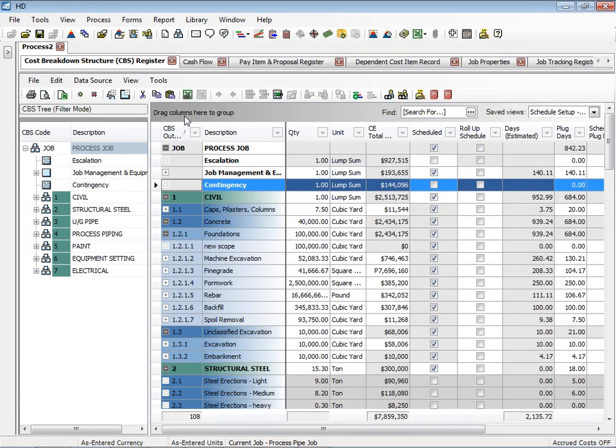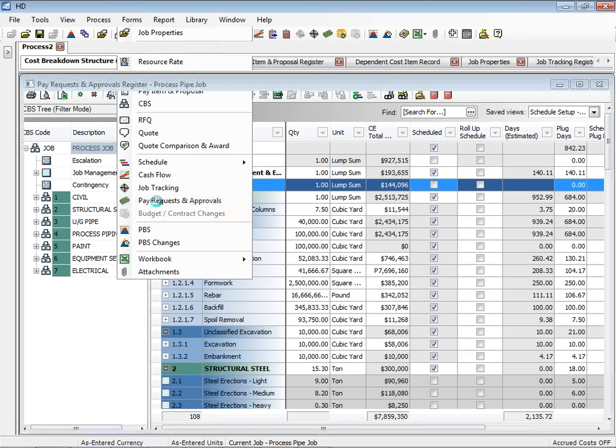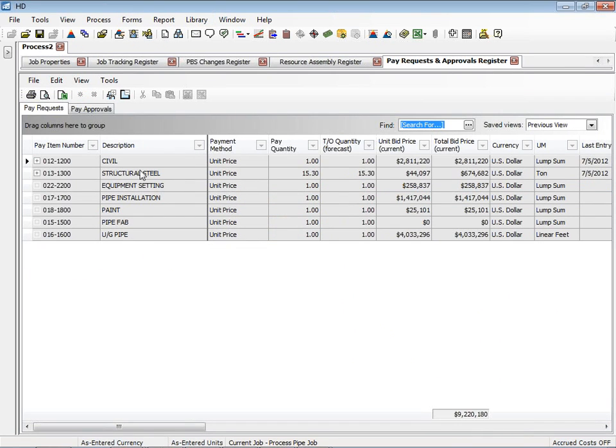Yeah, so I would say that I've not seen necessarily a typical one. Everybody kind of uses different formats, in terms of how much detail do you want, how much backup do you want, is it T&M work, is it unit price work? So a lot of different flavors of that. But know that we do calculate what we call pay requests. So as the work progresses, in fact, now that we put in some percent complete on this job as a unit price job, we will probably see some earnings in here.